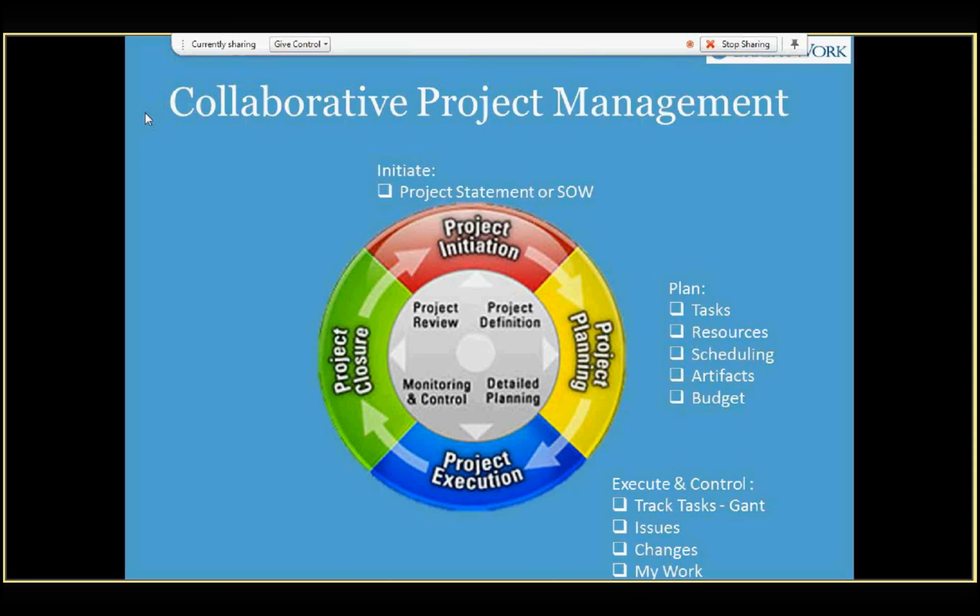And this is almost a portal page for your teams to look at so they can see exactly what's been assigned to them and what they need to work on. From a communication standpoint, because it's SharePoint, again, we can track all documents related to the project. We can even go to a task level and say, show me all documents related to this task immediately. It's all in one place. It's all in SharePoint. Any meetings, any discussions, even alerts for overdue tasks, alerts for issues, alerts for overdue costs, all can be done in a collaborative way through SharePoint.